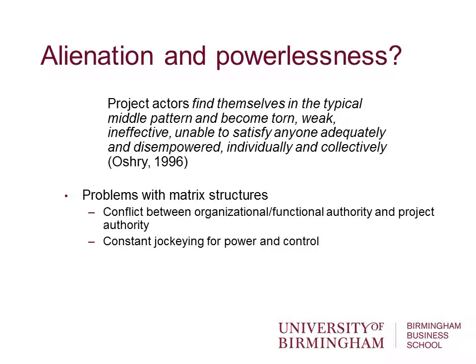So it's around conflict between organisational and functional authority and project authority. It's about constant jockeying for power and control. The project manager's trying to pull resources to his or her project. They are responsible for project delivery and that's their focus. The organisation or the function doesn't want to lose its capabilities and resource, so it's pulling resources back into the function, and the person seconded to the project, or asked to work on the project, is being pulled by this tension.